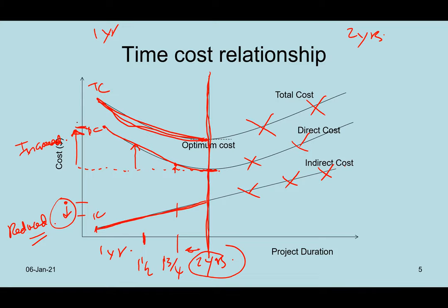If we reduce the project duration, what could be the potential new cost? Either in terms of indirect cost and then direct cost. When you add the indirect cost and direct cost together, for sure you are going to get the total cost. We are going to know the new total cost. What could be the new total cost? And the new duration, this is the new duration. This is what this class is all about, okay? Assuming the scheduler already planned the project according to the best possible, basically the lowest possible project cost. That is the assumption.